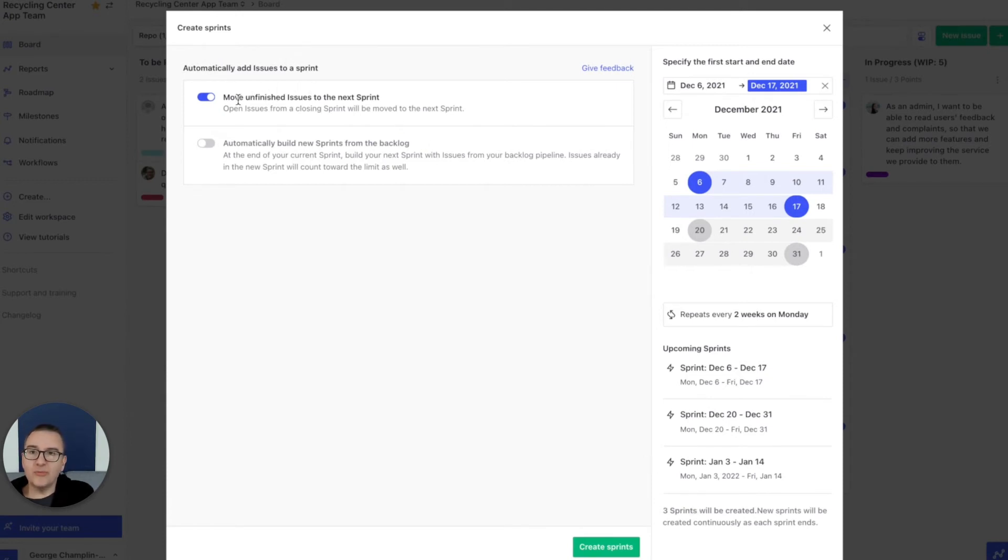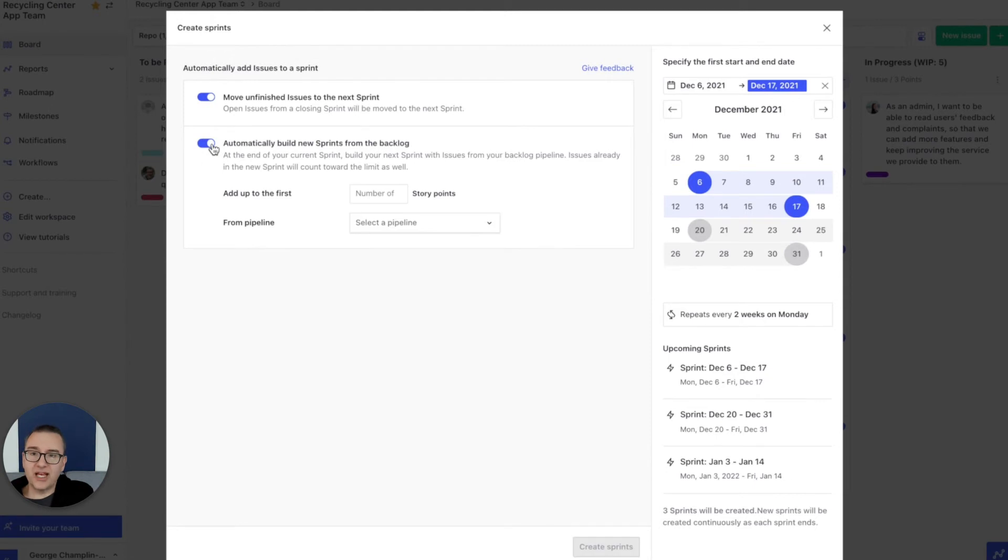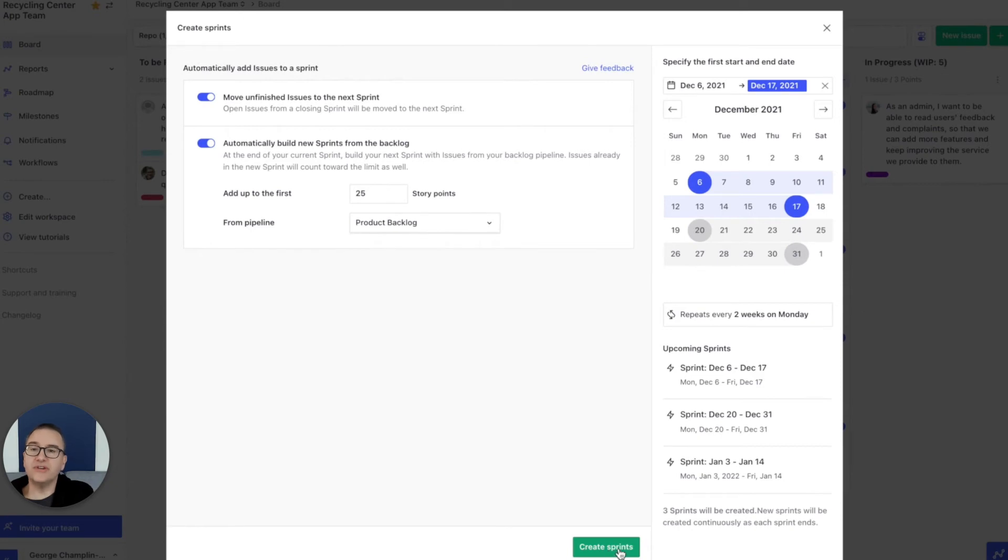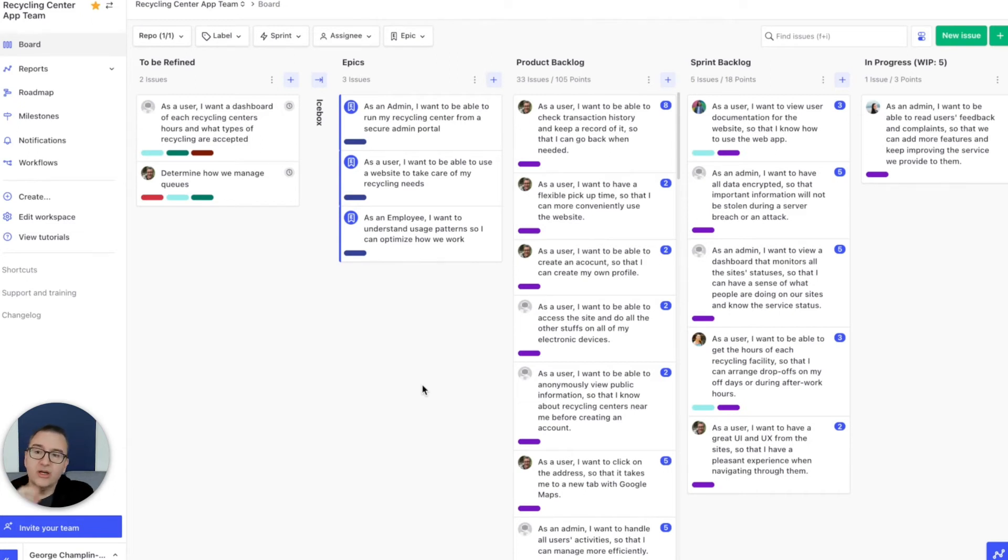Any work that doesn't complete from one sprint can be automatically moved to the next sprint. You can turn that on or off. And then you can automatically build new sprints from your backlog. Flip that switch, we'll add 25 points, and then pick the product backlog as the column to feed our sprints.